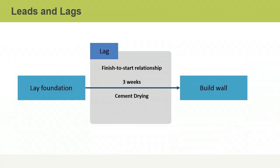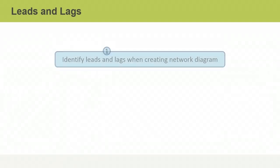A lag, on the other hand, delays a successor activity. For example, if cement must dry before the next scheduled activity can start, the finish-to-start relationship between these activities represents a lag. The technique of applying leads and lags is essentially a three-step process. First, you consider possible leads and lags in the schedule when sequencing activities — when you're creating the schedule network diagram and plotting activity dependencies and relationships.